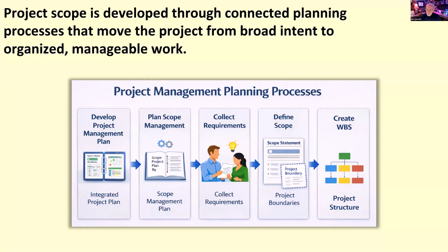And one of the things I want to point out here is that the prior language to PMBOK 8 was for the work breakdown structure, they now just call it project structure and creating a project structure. And that can be in different forms, and we'll look at some of those. But the project structure concept fits better with the other adaptive and hybrid approaches where you might not have a real connected structure like we see on the screen here under the Create WBS.